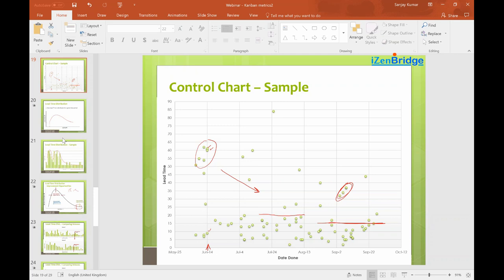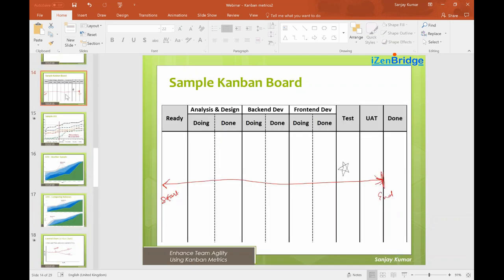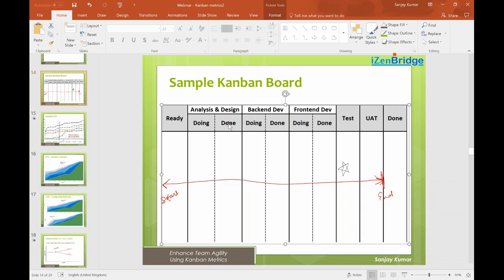Question: in Kanban, is testing not happening in parallel — the sample board shows step-by-step activity? This is one particular team's flow, and each item flows independently. Development and testing can happen at the same time for different items. The exception is when testers are creating test cases — for that team, if a tester was creating test cases while an item was in back-end development, they had some visualization to note that on the card. Teams can customize: some use one 'Development' column rather than separate back-end and front-end columns.